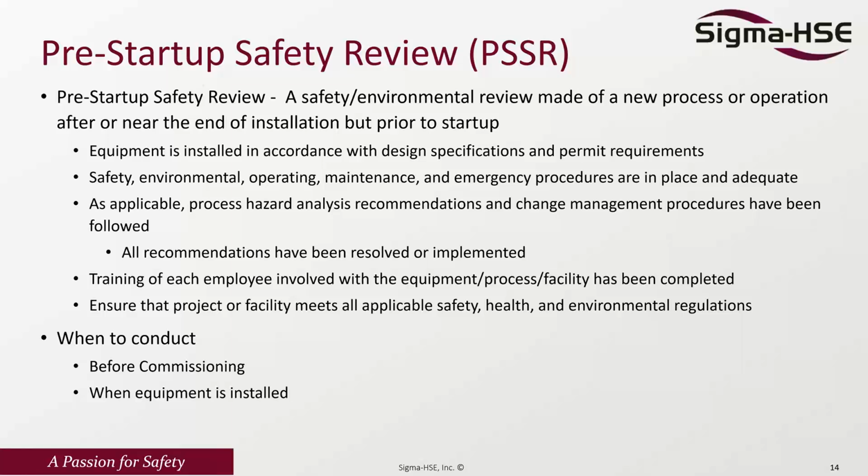So the purpose is to ensure that the project meets all of the applicable safety, health, and environmental regulations. This is conducted when the equipment is installed and before commissioning.